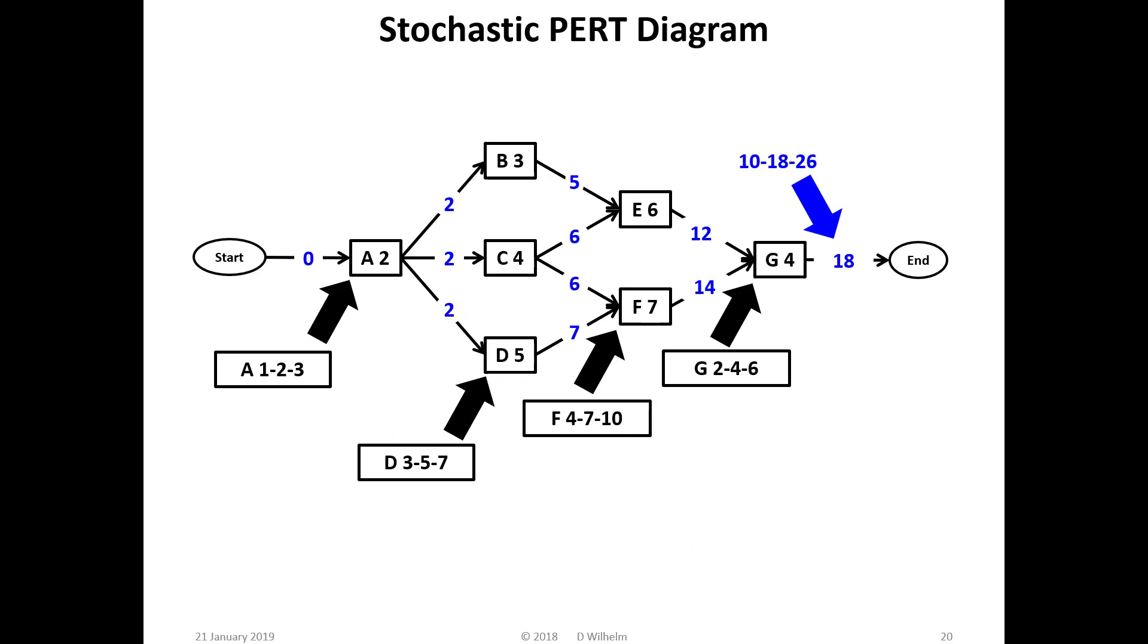We've treated the task execution times as deterministic. There is often some uncertainty how long a task will take. This stochastic PERT diagram shows the individual uncertainties and the resulting uncertainty in the project cumulative elapsed time. Instead of task A assigned as 2 days, optimistic time is 1 day, expected time is 2 days, and pessimistic time is 3 days. Similarly for the other task execution times. By the time we get to the project cumulative elapsed time, instead of 18 days, it's between 10 and 26 days. As a project proceeds, we can get feedback from the Gantt chart and convert some of the early stochastic times to deterministic times.